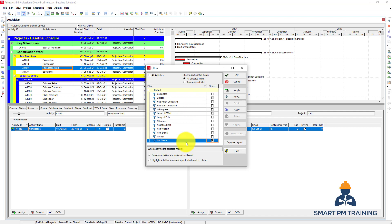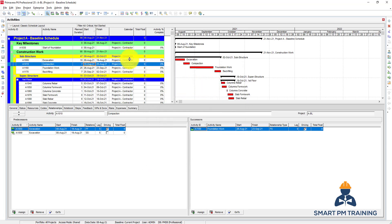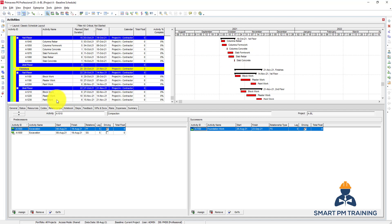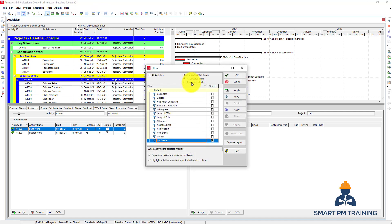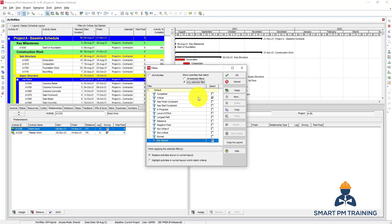Both conditions have to be met. Let's apply and see how it looks. For critical activities, total float is zero, and these are the activities that are not started yet. Now let's change it to any selected filter — Primavera will show all activities that are critical, plus any activity that has not started yet regardless of whether it is critical, because Primavera will filter any activity that meets at least one of these conditions.